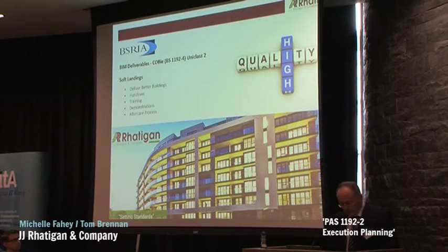these are the standards that we implement in our BEPs and BIM process. As quality manager, when we're writing the BEPs, I integrate the BSRIA Soft Landings into the overall process, and this helps us to deliver buildings through the BIM process which are of very high quality standard. We implement the handover, the training and demonstrations, and a key element here is the aftercare process, which deals with the asset information model.